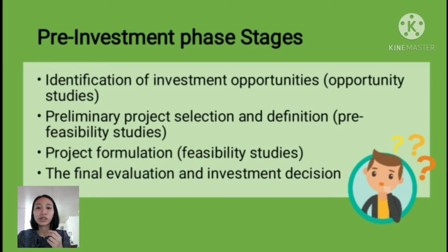And next is preliminary project selection and definition, or the pre-feasibility studies. Since launching a feasibility study also entails costs, this will help them identify whether it is worth the cost to launch a feasibility study over a particular opportunity or not.